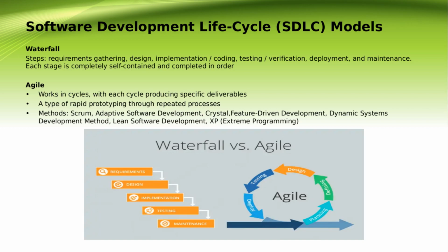Testing is conducted with each new release or iteration. Iterations generally last 1 to 3 weeks. The Agile model relies heavily on customer interaction and can easily be derailed if customer direction is not clear. The model is not suitable for products that require complex dependencies.